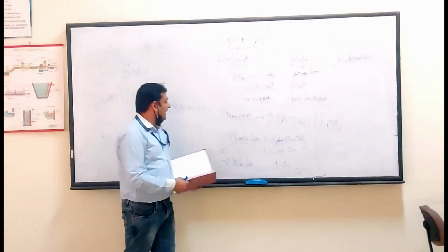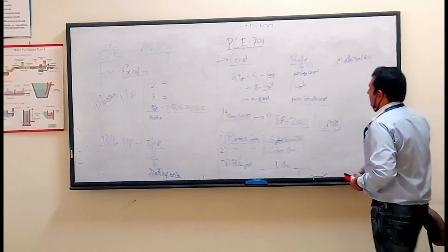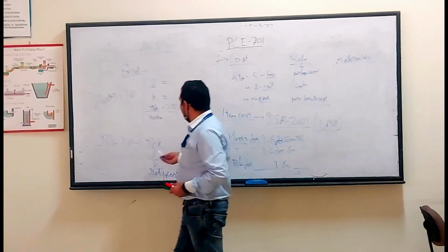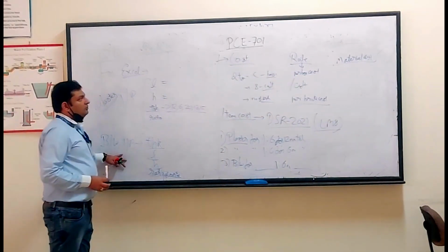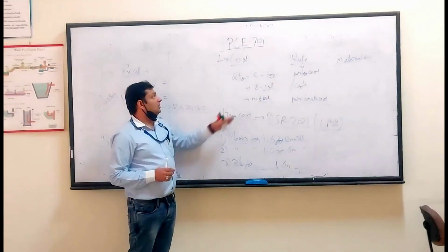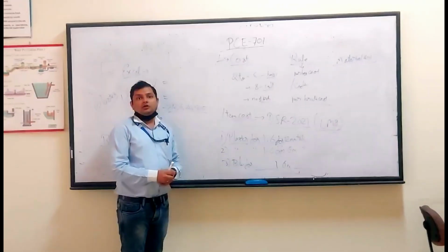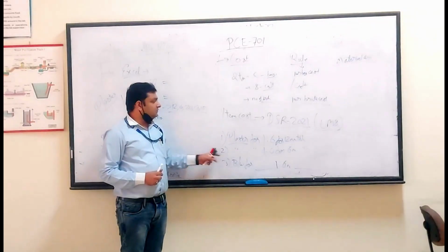This typical item will consider the cost of your bricks which you have tabled over here, the cost of your masonry mortar, which is the cost of cement and sand for the masonry mortar, and the construction of it. All the three will be coming in this component.